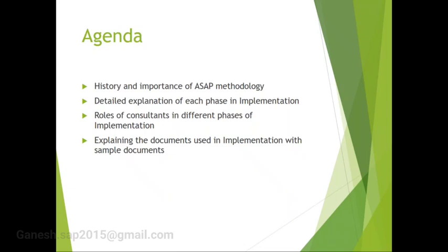In the realization, we get the server so that we do the configurations and the testing, and then the user will do the testing. We conduct trainings before user testing. After that, we do the cutover, and then the go live. After realization, we will have a final preparation, and the final step will be go live. Then we will do the support. Application support will be given as per the agreement. How many years they are going to give the support will be specified there.